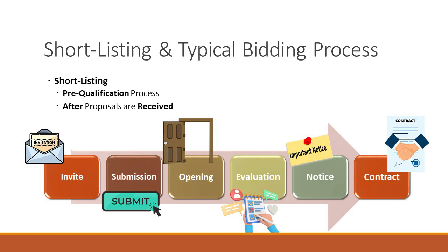And during these last 3 bullets, you may be negotiating terms of the contract. There may be some more details that are specified, especially during the best value method. If it's the lowest responsive and responsible, sometimes right upon opening a bid and award, you get the contract signed right away because part of your bid was to accept the contract as drafted. So that's your process.